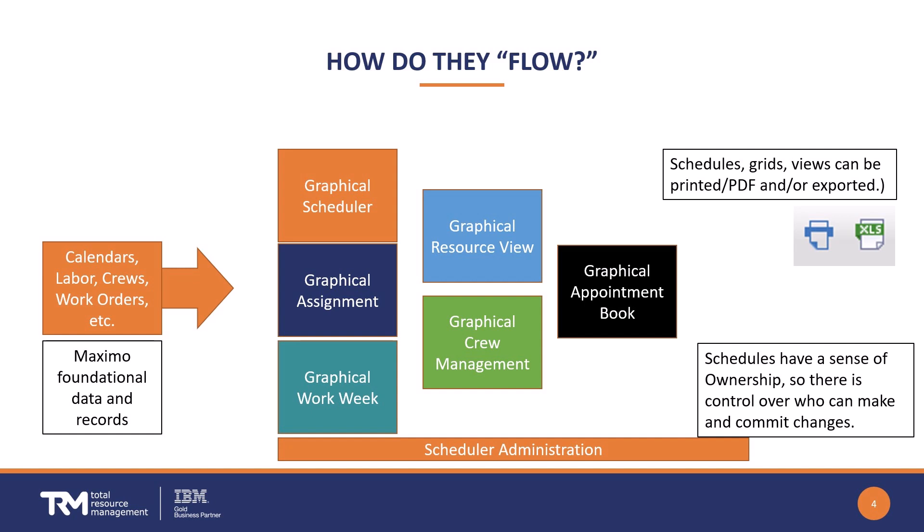Secondarily would probably be graphical assignment, where you're able to assign people different work. Then for folks out in the field, the graphical work week would be a good application for them to use — they can see what they need to focus on for the week based upon what you've done in the scheduler and the assignment app. Then there's the graphical resource view and graphical crew management, which are good for ongoing changes to who's available to do what. There's also functionality called the graphical appointment book, which has a traditional application behind it — useful for folks making appointments with customers. You're also able to print these schedules out in PDF form or export to Excel, and they also have a sense of ownership.